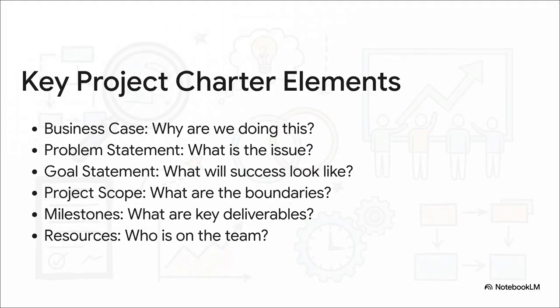So let's crack this thing open. What's inside? Well, you've got the business case. That's your why are we even bothering? You have a super clear problem statement and goal statement. That's your what. The scope, that sets the boundaries. Milestones map out the journey. And resources tells you who's on the bus. See? All those core questions answered right here in one place.